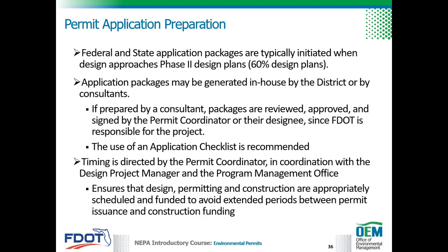Timing is directed by the permit coordinator in coordination with the design project manager and the program management office. This ensures that design, permitting, and construction are appropriately scheduled and funded to avoid extended periods between permit issuance and construction funding.